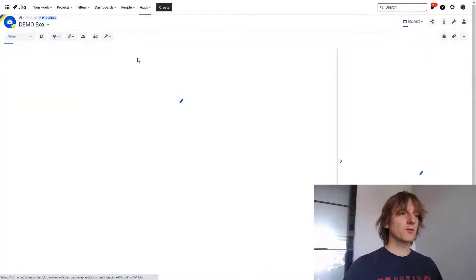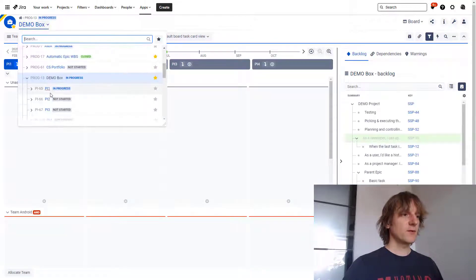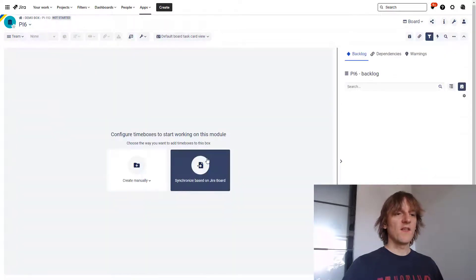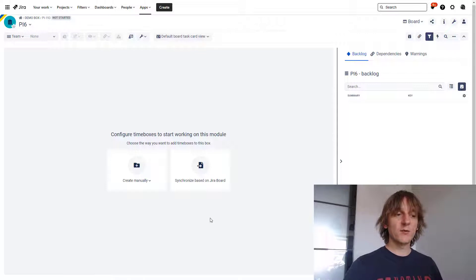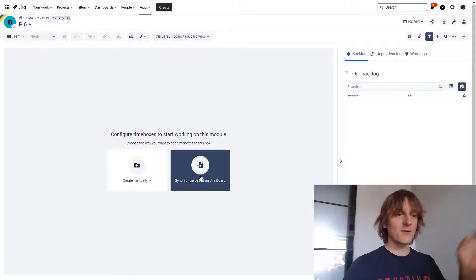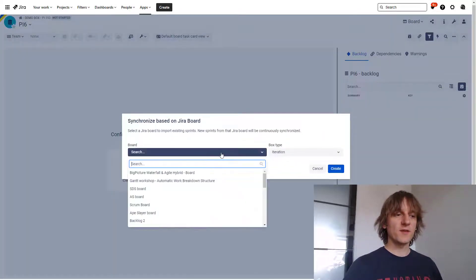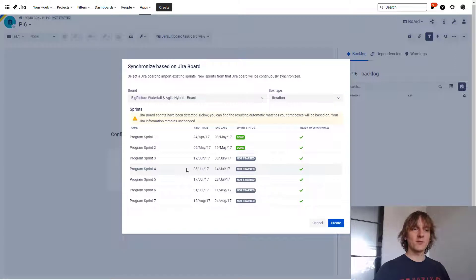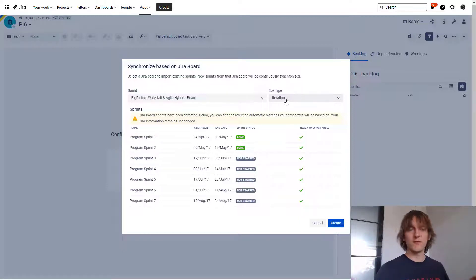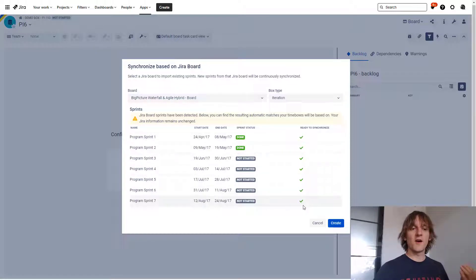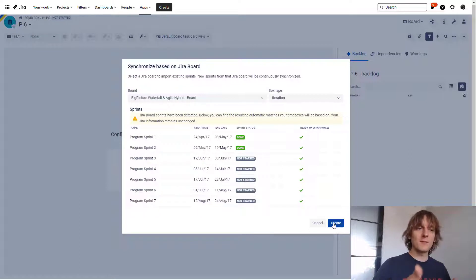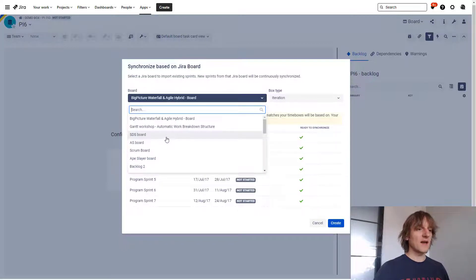Moving on to the board module. Let's visit the board module, and I think we will have to switch the box. Yes, we will. So I've created a new PI in my demo box. It's called PI6. Let's switch to this one. And this one doesn't have any iteration in it, so then BigPicture is asking me to create those iterations. I can either create them manually, or I can now synchronize it with the JIRA board. And if I click this, I get to choose the board that I want to or should synchronize with, and I will just choose one of those, doesn't really matter because I'm not going to follow up with it. Then you choose the box type that is supposed to be created. Normally under the program increment it will be iteration, but you might have a different one. And then it reads all the sprints that are available in the board that I've selected over here. And for all of those that are okay, it will tell me that there is a green tick over here. And by hitting create, I will just create a list of boxes now that will be automatically linked in terms of the scope to those sprints. So that's pretty cool.